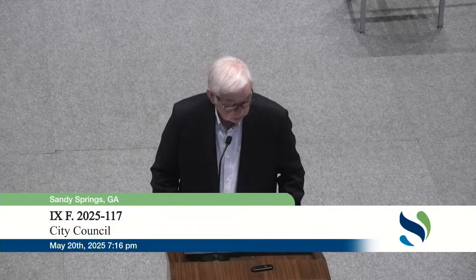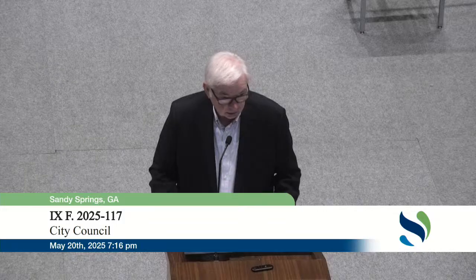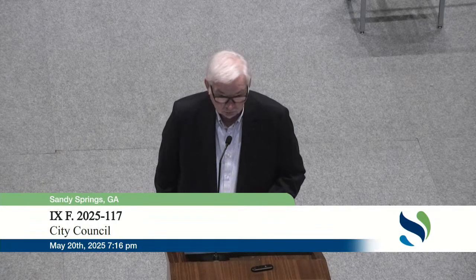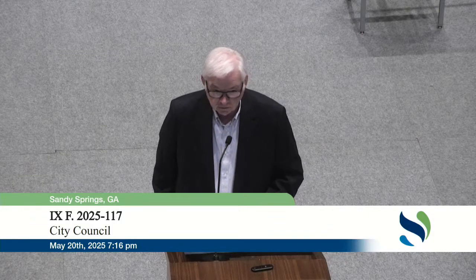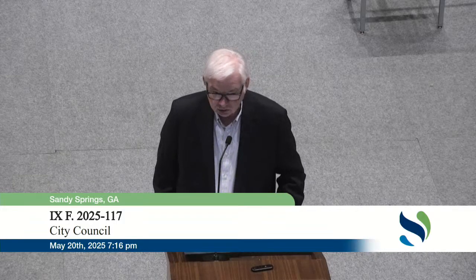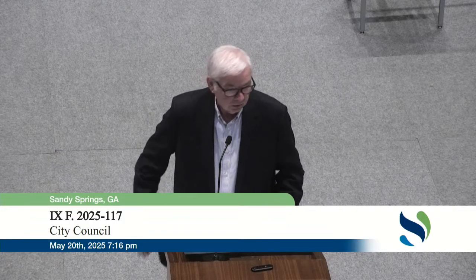The change order I bring to you tonight has a couple of components to it. The first of those, again, further drainage system design changes. That total for this requested change order tonight is in the amount of $192,269.96. That is necessitated by conflicts between Atlanta Gas lines, their relocation and adjustments within the right-of-way, and the lack of available right-of-way to further adjust the storm drainage system within particular portions of the project.